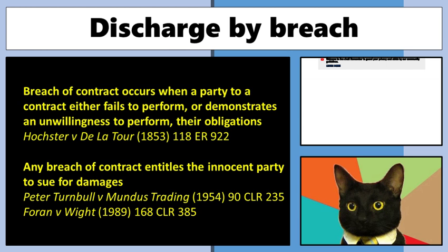And this is really important to note, any breach of contract gives the other side a right to sue for damages, money. All right, so that's the first thing you need to know. Very important rule. Any breach gives the other side the right to sue. Look, sometimes it may not be very much money. Here's $100, go away. But strictly speaking, the rule of contract says a breach of contract always entitles the other side to a money remedy. Now, that's nice to know. It's good. We don't want to go to the courts just to get $100.